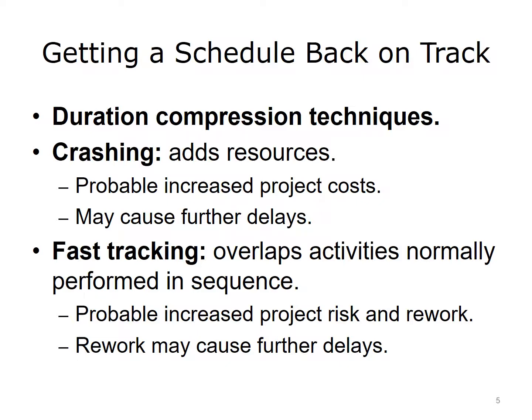Sometimes, despite all your planning, schedules get behind. Two approaches to compressing your project schedule include crashing and fast-tracking. Crashing adds resources to help complete an activity on time. Crashing the schedule will probably result in increased project costs. If you are adding team members, it may even create further delays, because current members will have to spend their time bringing the newcomers up to speed.